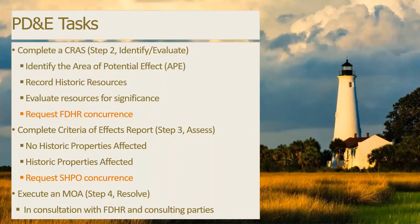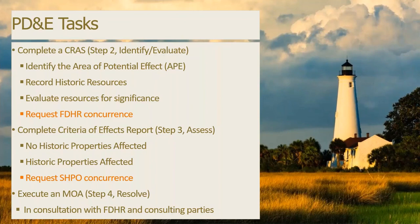As a general task list for project managers during PD&E: our consultant will complete a Cultural Resources Assessment Survey, or CRASS, which will identify cultural resources and evaluate them for significance. That document gets sent to DHR and we request their concurrence. If they concur, we move on. If the CRASS did identify historic properties in the APE, we evaluate the project's effects to those properties in a Criteria of Effects Report — sometimes called a Section 106 Case Study Report. That determines whether our project's effects are adverse or not adverse, and it's also sent to DHR for concurrence. If effects are adverse, we execute an MOA in consultation with DHR and any other consulting parties.